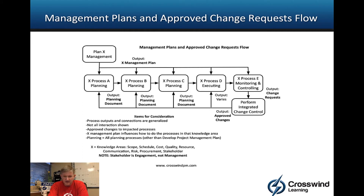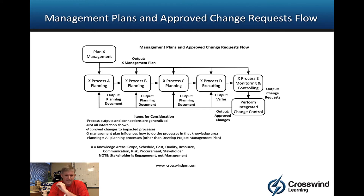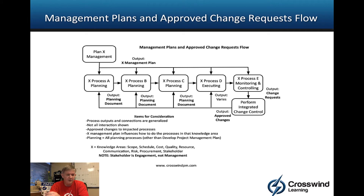Those change requests go into Perform Integrated Change Control, which is our only master change control process. Every process that creates a change request comes to Perform Integrated Change Control for a yes, no, or 'we'll see.' As a result, an approved change — while it might not specifically be an input to every process — could lead to adjustments in the output of planning processes A, B, or C, or a change in how we're executing whatever process D is.